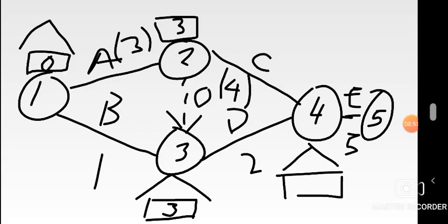1 to 3, 3 to 4. There's a total of first 1 plus, okay, there's a 1, of course, but the thing is, we have allocated something first of all to node 3, which is the only time 3 should start, after 3 days, as we recorded. Usually, in a case where you've just allocated a certain figure in a box, you would be picking from the figure in the box there. That's why you should pick it to go to the next node.